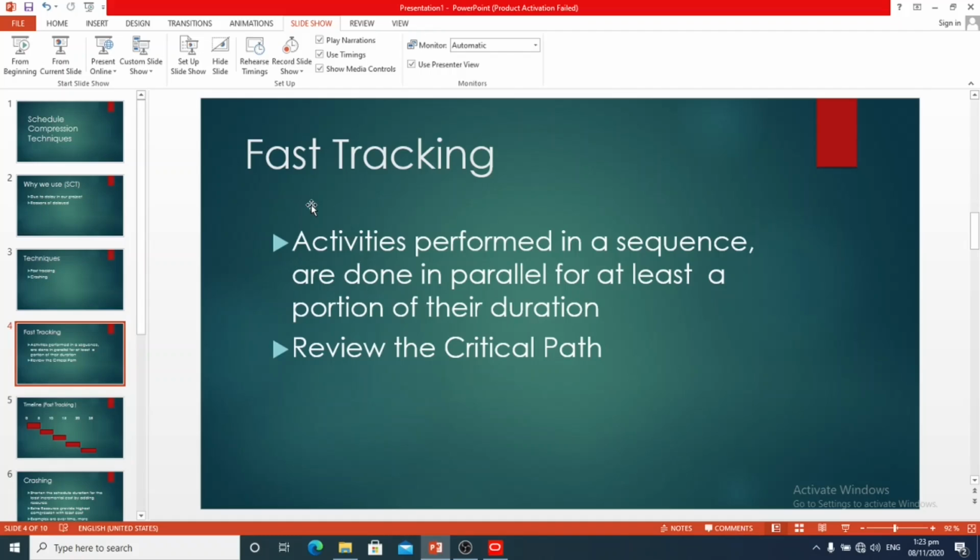You will not review the activities on the non-critical path as they have float. Reducing the duration of those activities will not affect the schedule, it will only give them more float. You should monitor other paths whose durations are close to the critical path. If any other path becomes critical, you will reduce the duration of the new critical path. In this case, your current path will no longer be critical.